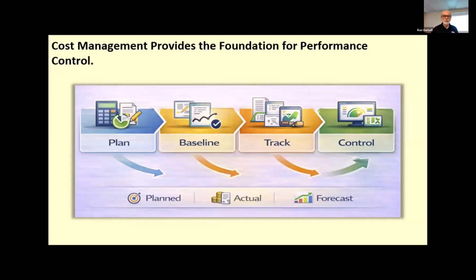In project management we have something called the performance measurement baseline, and it's a combination of the schedule and cost. So it's a time-phased baseline. Some people just call it the cost baseline. It's created when we've built a schedule, estimated all the resources, and estimated the cost of those resources. We've aggregated everything up, with our contingency and management reserves, into one budget.